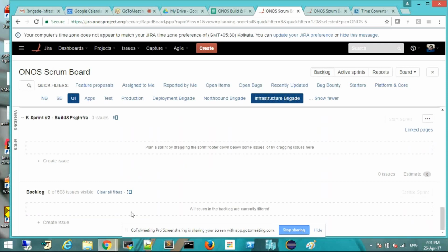Fibonacci series 1, 3, 5, 8. The story points are on the Fibonacci series. And then don't use a large one, because that's the whole sprint, so try to scope it smaller. Alright, but we have an association of the story points to time frame so that it's consistent across the whole board. Okay. So I can send that out. Sure. Yeah. And then there's version, and then that's it.